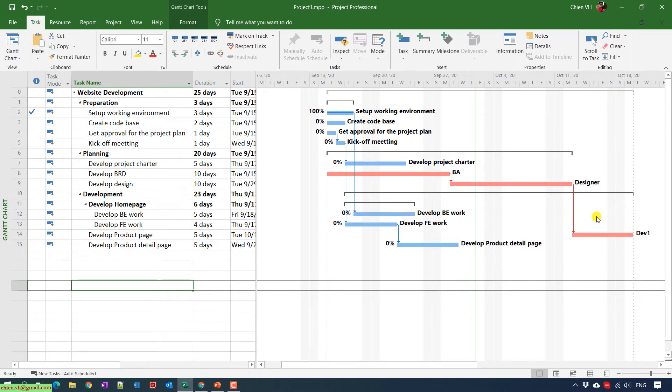Otherwise, if any task on the right side of this line, if the status of completed is greater than zero percent, that means this task will be ahead of schedule.